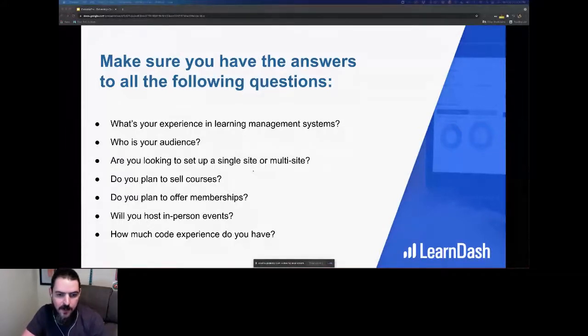or are they going to be able to use the system itself? Another thing to keep in mind is, does someone want to sell on one site and give access to courses on an additional site? And that's all doable with plugins. But you're looking at probably an additional half day's worth of work to integrate a plugin like that. And then when you have to start setting up an entirely different sub-site, now you have pages you didn't have to worry about, like an additional homepage.